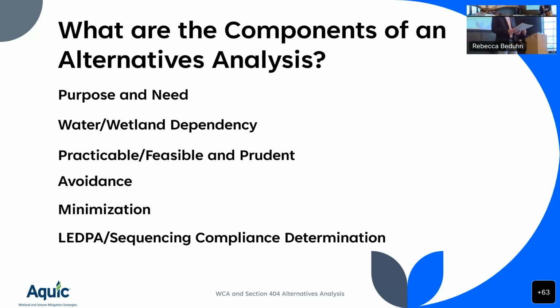And then practicable doesn't mean most convenient. It doesn't mean least expensive. Those are factors. Cost is a factor, but it isn't about what's the least expensive. And I know that's the same, Dave's going to say that's the same for WACA too. Okay, that's the basic framework. I'm going to stop there.